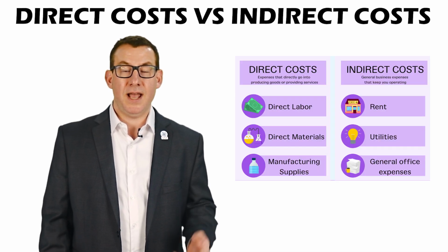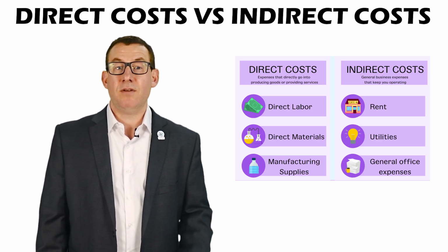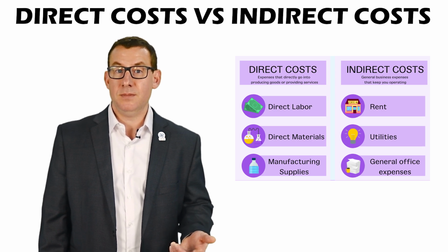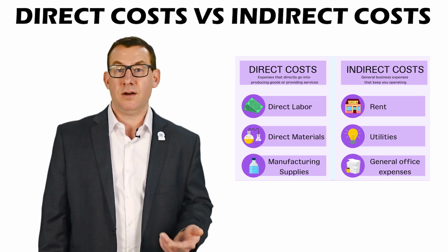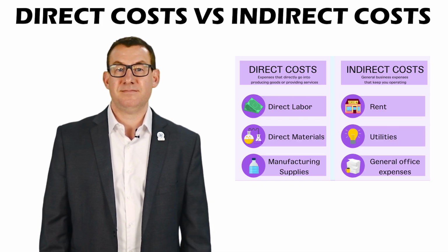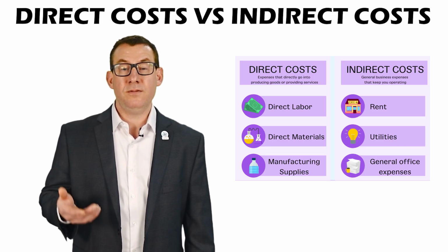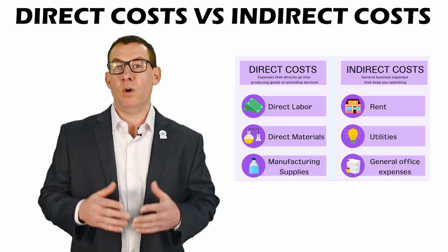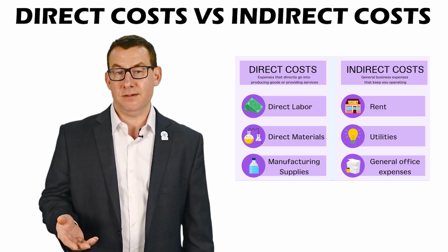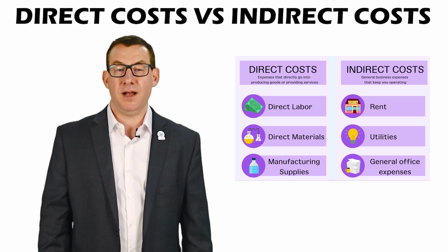Direct costs and indirect costs. Direct costs are tied directly to the project: staff time, software, hardware, travel, and contractor invoices. Indirect costs, or overhead, are organization-wide expenses, like rent, utilities, and general administration. Indirect costs are often rolled into billing rates as a multiplier.